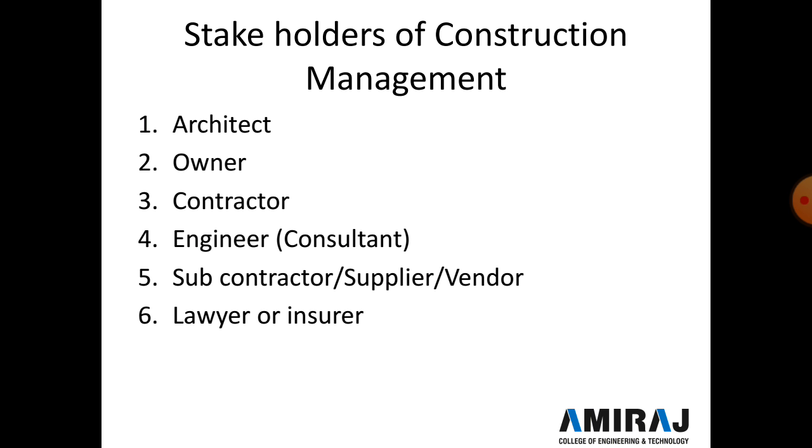The contractor submits the running bill for payment based on the progress of the work and the material brought to the site. Proper interaction between the construction team, like owner, engineer, architect and contractor, leads to smooth and efficient execution of the construction project.